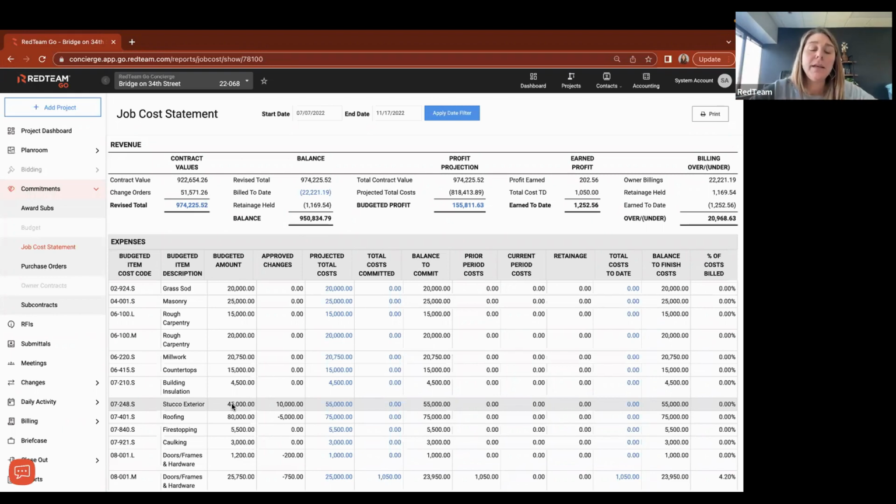So during that buyout stage, hopefully we're leaving our profit alone or we're increasing our profit, but we have occasion where we know that we're going to break a budget. Maybe we didn't have a solid number from a subcontractor, and when we got one, it was more than what we plugged the hole with when we were in the bidding process. And so we do have occasions where we may dip into our profit a little bit or dip into our contingency a little bit and add money to a cost item in the will start soon phase.